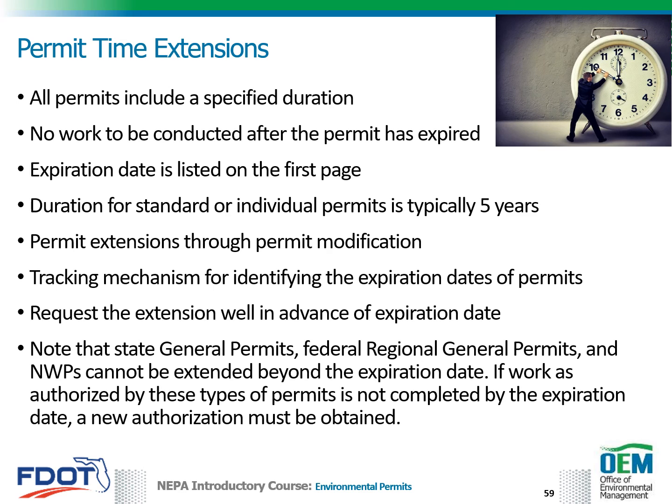The staff should specify the period of time necessary to complete the project, so a new expiration date can be set. Note that state general permits, federal or regional general permits, and nationwide permits cannot be extended beyond the expiration date. If work as authorized by these types of permits is not completed by the expiration date, a new authorization must be obtained.